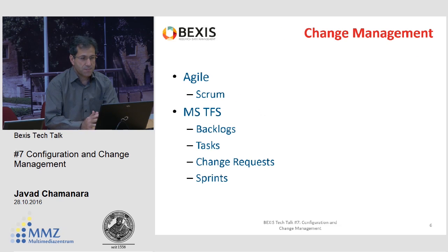For the change management, we are using Scrum, actually a customized version of Scrum. From the tooling perspective, we use Microsoft Team Foundation Server as our work item management. So work items here can be tasks, features, any change requests, and so on. And then we have the usual backlog items for the whole product, the tasks that are going to be assigned to the people and tracked: if they have done them, in which iteration they have done them, and what was their change set, and so on, for auditing.